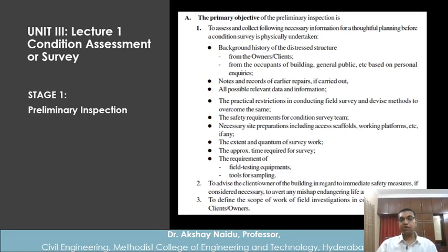It can be an industrial or factory building which may not be available 24/7. So there are certain restrictions. Some of the tests that we may have to conduct require that no one is around. People are not working. For example, when you have to take deflection measurements, when people are moving around, the deflection measurements could be very sensitive.